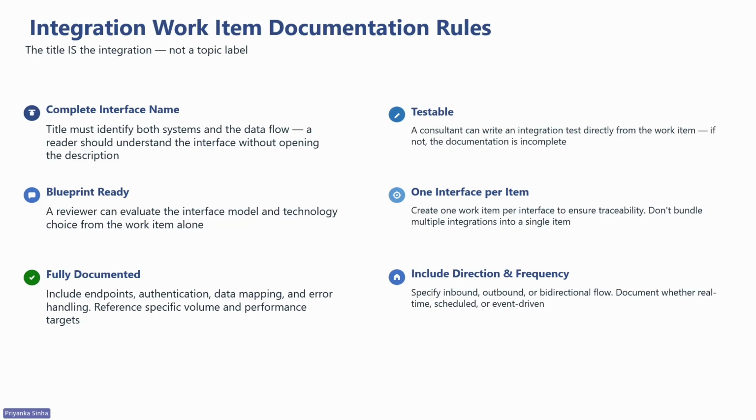And the next one is testable. A consultant should be able to write an integration test directly from the work item. If they can't, it is not documented well enough. And then one interface per item. I said it earlier, but I'm repeating it, because creating one item per interface for traceability is really important.